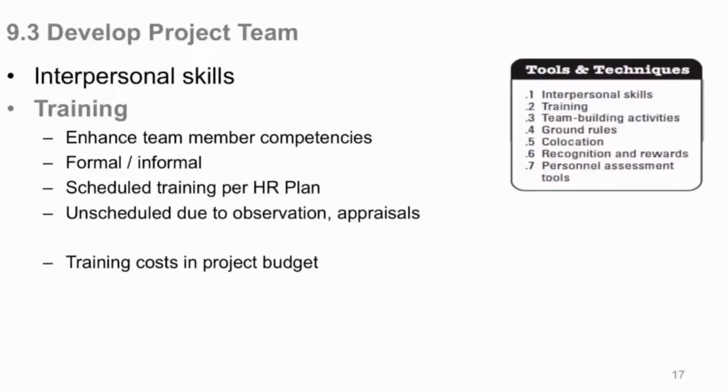And for that matter, when it comes to our schedule, when we finally get to scheduling it, and in the budget also, you need to have time and money allocated for your team. Project management of the project is its own cost center, basically. So don't overlook that, and don't overlook that in your WBS when we get to the work breakdown structure, because it's a viable component. Just because it's you and the project team is no different than anybody else doing work on the project. So we'll see that when we get to schedule management.